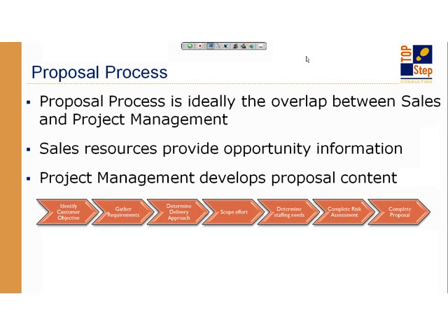And then completing that risk assessment, identifying where potential shortfalls are within the organization, within the customer organization, within potentially the approach that's being delivered. Maybe budget constraints, maybe the schedule has hard deadlines that can't be moved. All of those contribute to understanding how best to manage the project and also what the risk is to closing the deal. And of course, completing the proposal itself.